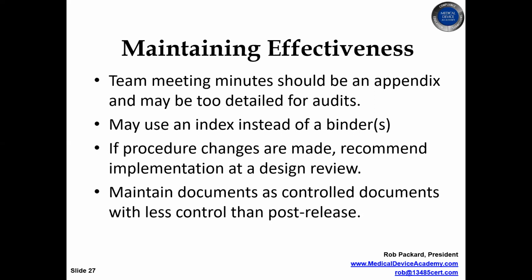If your design control procedure changes over an 18-month period, which is not all that uncommon, it happens all the time, my recommendation is for any projects that are in process, implement the change to the procedure at the next design review. For any new projects, you'll implement it at the beginning of the project. So that's one way to phase in changes, just like if you made a change to a design.